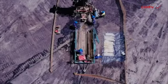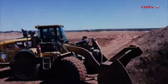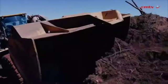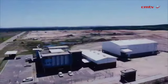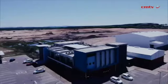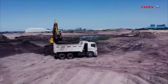And we have two parallel employment activities happening. So we have a construction period. That construction is largely subcontractors under the EPC contractor. And over a period of 42 months, probably in year two, you'll see the number peak at 3,000 people on site. And in that number, there's quite a large contingent of young engineers that will come in through that process. And that runs over a period of 4 years. So that's quite significant, especially in the Richards Bay area.